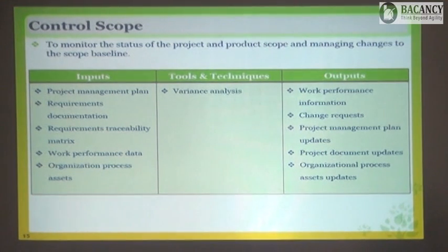The requirement said that we need 3 functionalities in this deliverable. We will have the raw data on how many functionalities have been met, and then we do a variance analysis, we do a comparison, and then we say okay, we actually missed out on one functionality, and now we need to know how the missing of that one functionality is going to impact our overall project.